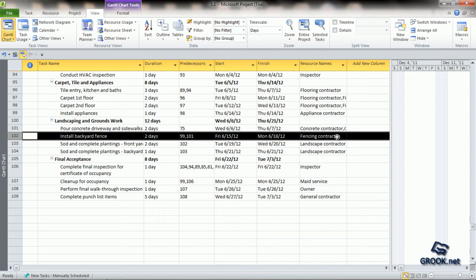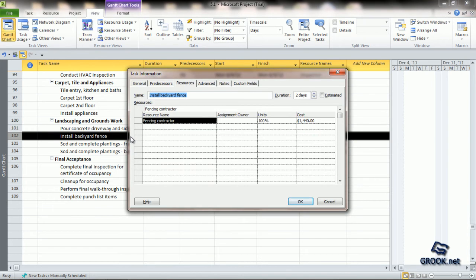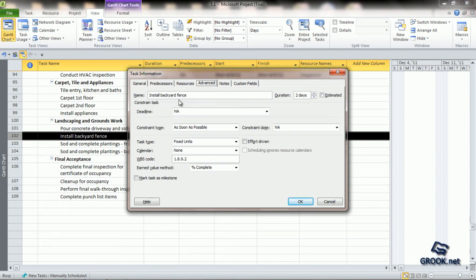We will assign an additional resource and see what difference it makes. First, we have to convert this task into an effort-driven scheduled task. For that, we can simply double-click this task and the task information dialog box opens. We can leave the predecessors and resources tabs and go to Advanced. In Advanced, you can see the name of the task, and to the right side there is a checkbox which says Effort Driven. We can click on the checkbox to mark this as an effort-driven task.